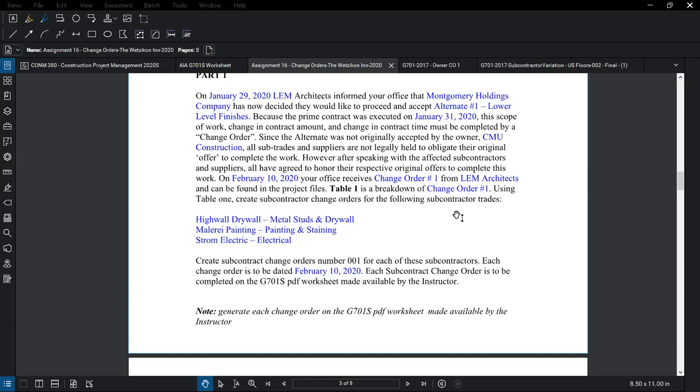The second month's change orders are going to be based off of 3 separate constructive change directives that were given to us during the next month. And then the final month, we are having a change order that's processed based off of a list of claims, which I introduced to you guys as logging them in and calling them potential change orders that were approved. And we have got that change order from those PCOs that have now come back to us.